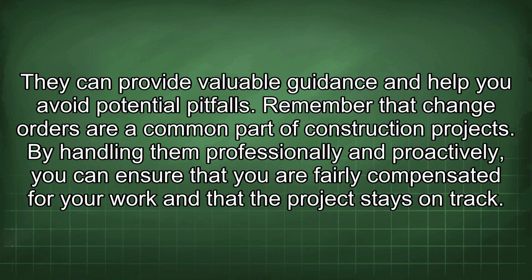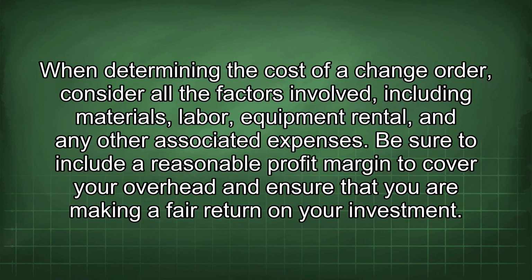Remember that change orders are a common part of construction projects. By handling them professionally and proactively, you can ensure that you are fairly compensated for your work and that the project stays on track. When determining the cost of a change order, consider all the factors involved, including materials, labor, equipment rental, and any other associated expenses.